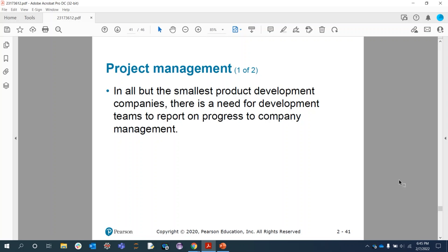So a self-organizing team has to appoint someone to take on the responsibilities, because of the need to maintain the continuity of communication with people outside the group, and rotating these activities around team members is not actually viable. The developers of Scrum did not consider that the Scrum Master should also have project management responsibilities. But in many companies, however, the Scrum Master has to take on the project management responsibilities. It depends on company to company how they actually operate.